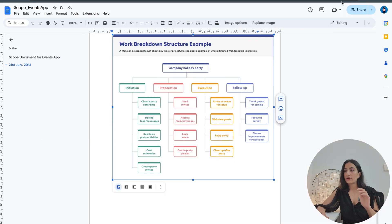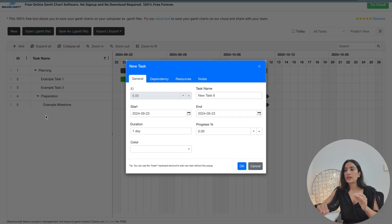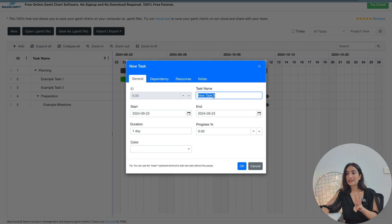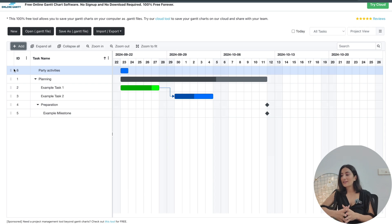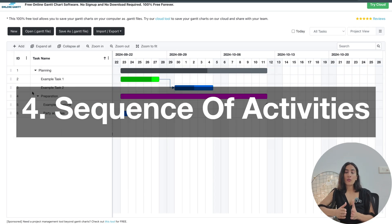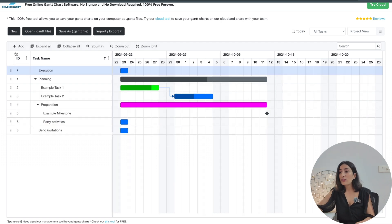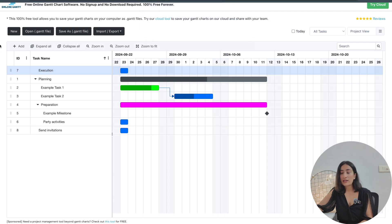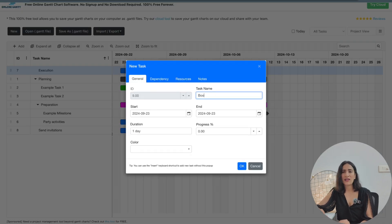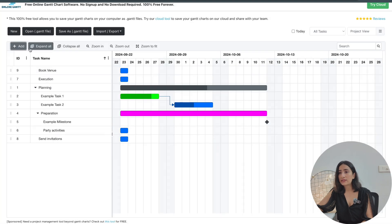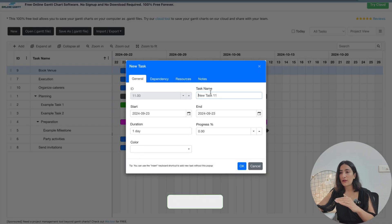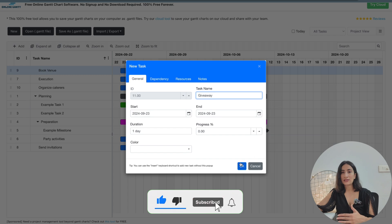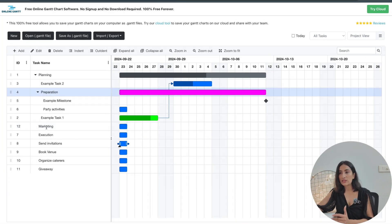Now that we have this, we know what all is to be done — we've created the activities and the smaller sub-projects to be carried out. The third step, after creating the Work Breakdown Structure and activities list, is to understand the sequence of activities: what happens before what, after what, and what will happen in parallel. Before creating the Gantt you can do this on pen and paper, but on tools like this you can quickly change them. I've listed all the categories and activities in the tool and now I'm adding the sequence — for example, only after preparation does the next task, marketing, happen.